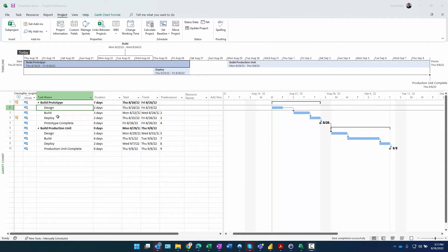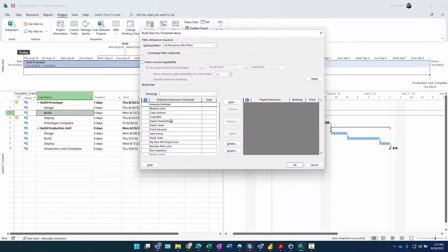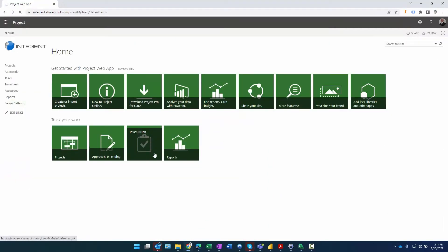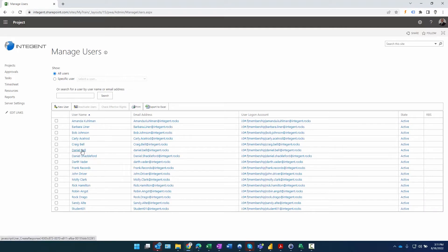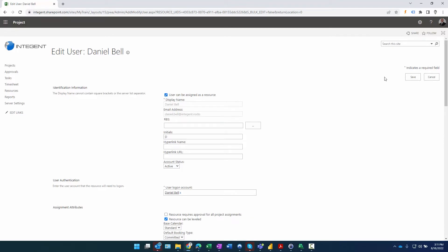The first thing I wanted to do is create a test project for this demo. Before going too far, I wanted to show folks something: when I try to build a team using Ctrl+T, my record isn't there. If I go to Server Settings, Manage Users, I can find my user record. If you're new to Project Online, a user cannot be assigned as a resource unless a specific checkbox is checked.